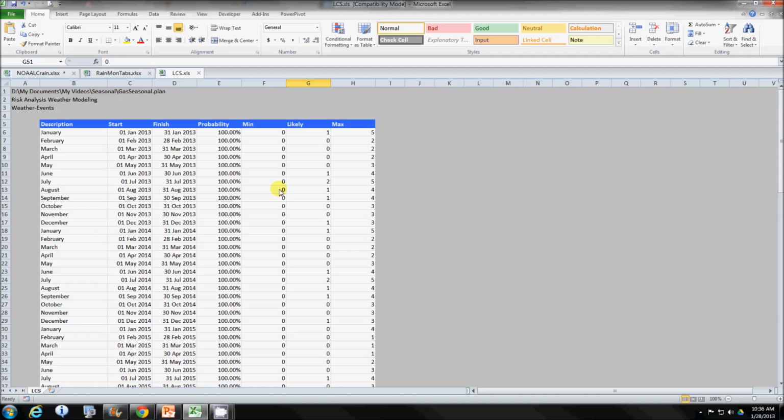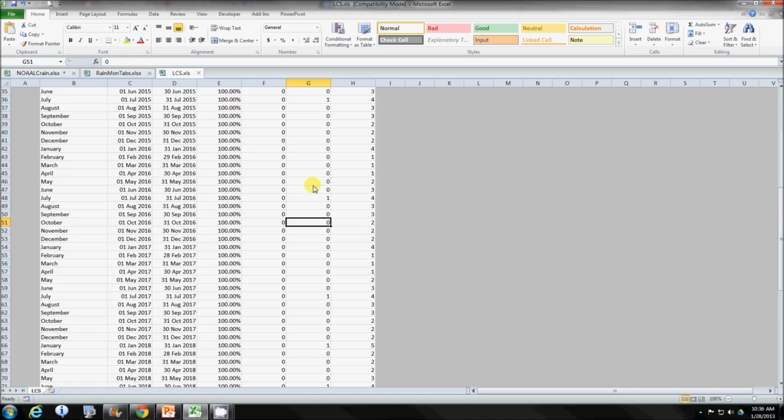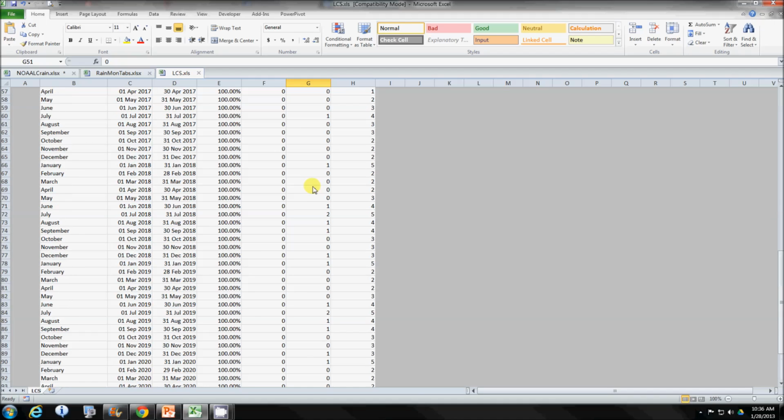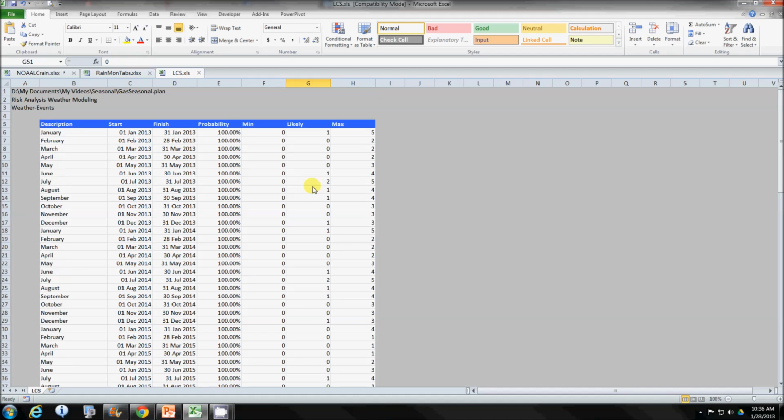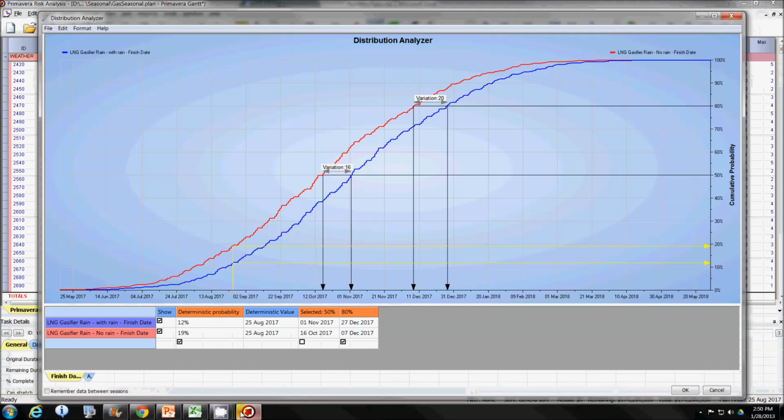And so this is the weather calendar. Obviously, I've removed any negative values here. It would cause, as you might expect, untold pain within PERTmaster. This is our results. Nothing particularly unusual here. Variation is 20 here, which for a 4-year schedule is not terribly impressive.